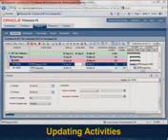And you can see for the activity 90100 that's highlighted there, we have a column that shows the start date, which in Primavera, anytime you see the start, that's going to show you either the early start of the activity if it hasn't started yet, or the actual start of the activity if it has actually started already. And then right next to it, we have the actual start column. So we're seeing it was scheduled to begin on January 31st, and then you can enter in what the actual start of that activity is.